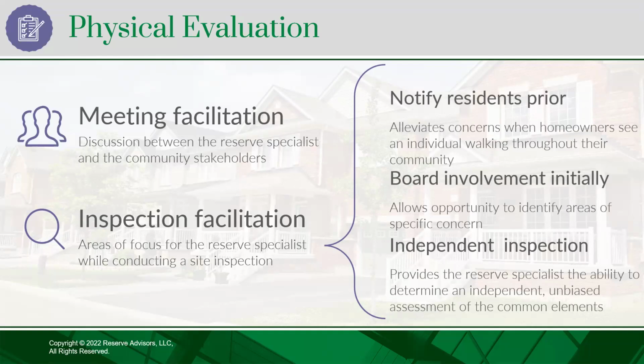We also had a quick question about DC, does DC require reserve studies, which I think at this time is no, Michelle, but I wanted to bring it up just in case. Right, you're absolutely right. DC does not, Virginia and Maryland do. It certainly is a best practice. CAI recommends updating reserve studies every 3 years now. That changed when they revised the standards last year. Virginia and Maryland require them every 5. So this area, as a rule of thumb, kind of does them every 5 years, plus or minus, because that's what's required by law. But best practice is every 3, and DC does not have that requirement though. So it's just a best practice.